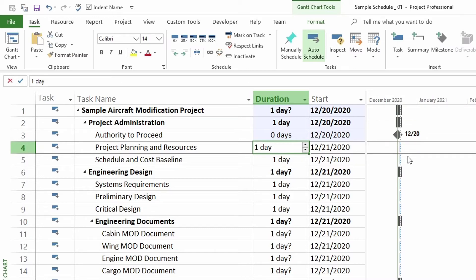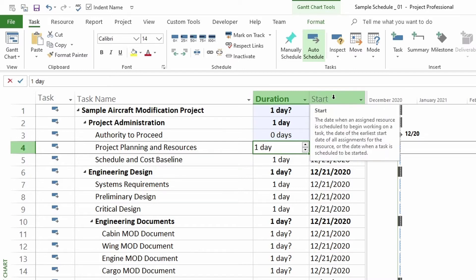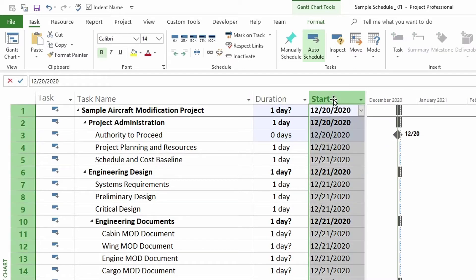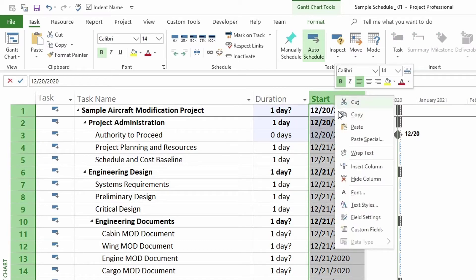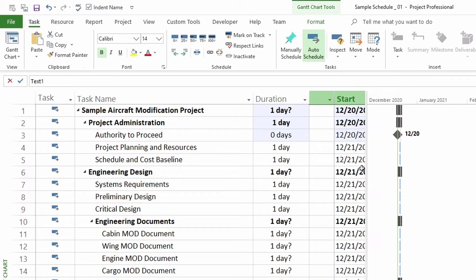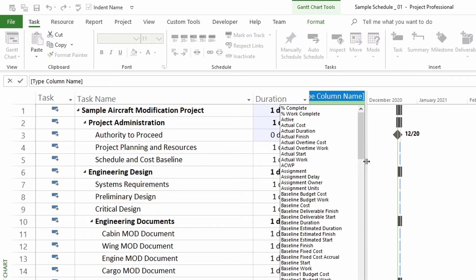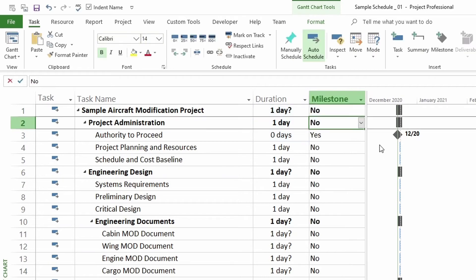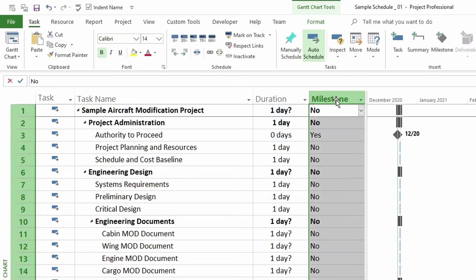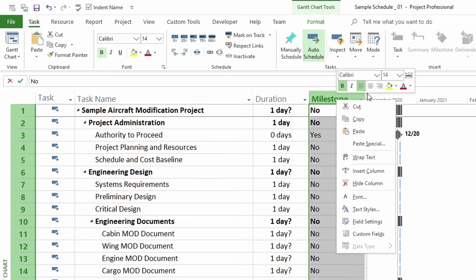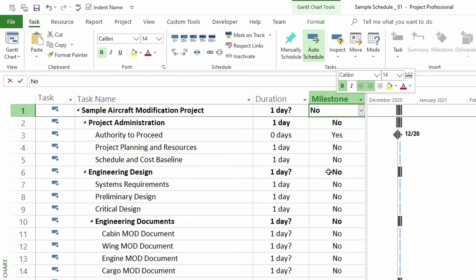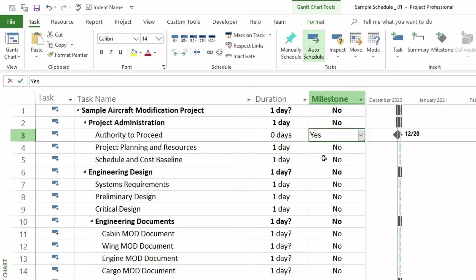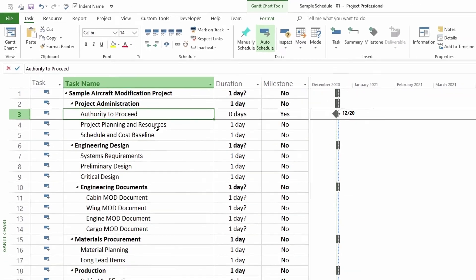Another way to know if it's a milestone is to add the milestone column. So let's click on start on the heading of start because I want my column on the left of start. And then I'm going to right click and insert column. And here I'm going to enter the column milestone. So start typing milestone. And click enter. And you can see which ones are milestones and which ones are not. If you can notice all of them are no except this one right here. It says yes, which is authority to proceed.